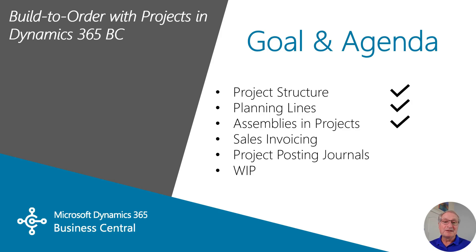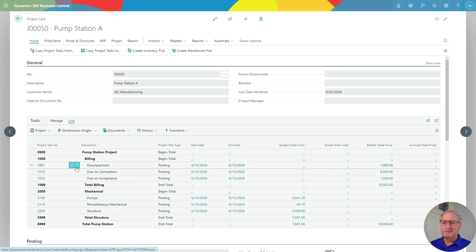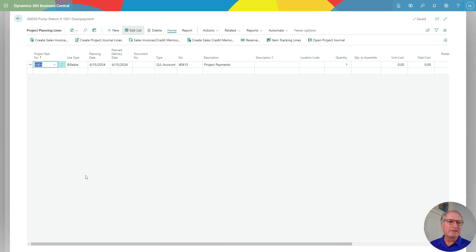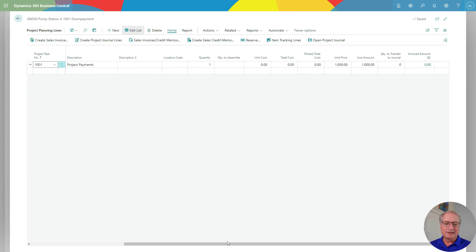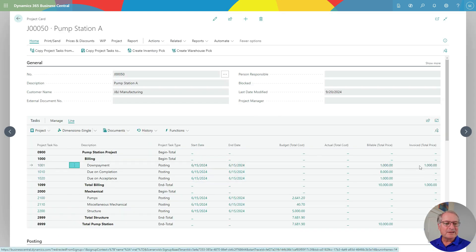Let's take a look at the sales invoicing — this is easy to do in Business Central. I'm back in the project and here's my billing schedule. I'm going to go ahead and bill the first down payment. I'll go into the planning lines. I can scroll over to the right and see the amount that's going to be invoiced — it's $1,000. All I need to do is create a sales invoice. Here's the sales invoice — it hasn't been posted, it's just been created. I can delete it, or I can go ahead, send it out to the customer, and post it, which is what I'm going to do. And I can now see on my project schedule that I've invoiced that down payment, so I'm ready to go.